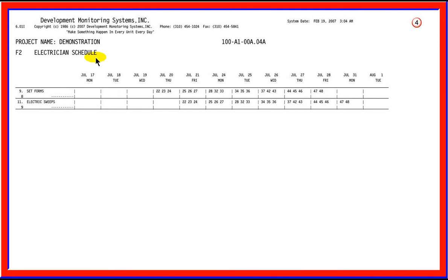This report gives 2 weeks advance notice of upcoming work. Both of these reports can be emailed and provided at a server site. Proof of receipt and notification of a schedule change is then accomplished. This is not only useful in job meetings, but makes them necessary and meaningful. This is real job planning with everything agreed to in print for commitment.